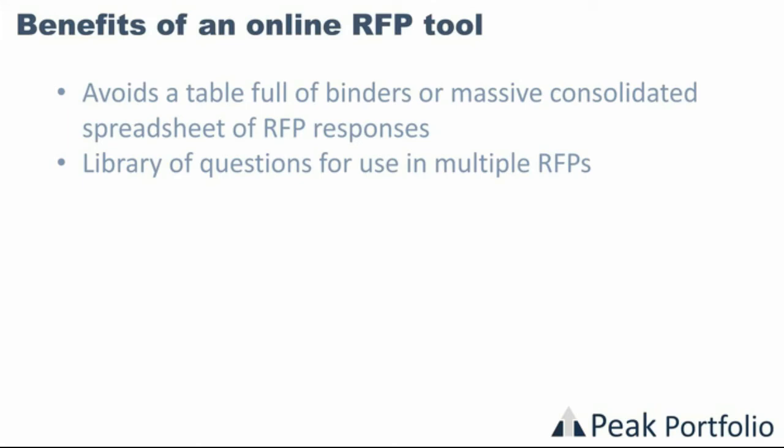the technology section. If you're selecting a cloud solution, it's going to be the same technology questions for every cloud solution that you select. Your architecture team is going to have the same types of questions for architecture, for security, for backup and recovery, disaster recovery. All those questions are going to be very similar for every cloud solution. So what you can do is spend the time to do a proper job of defining those questions once, save them in a library, and then every RFP after that you can just drop that category in there and use that for every RFP instead of creating it from scratch each time.